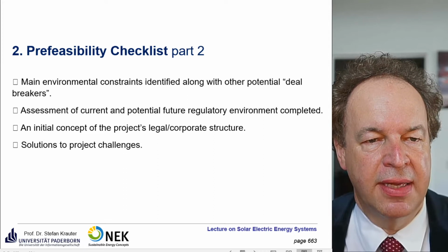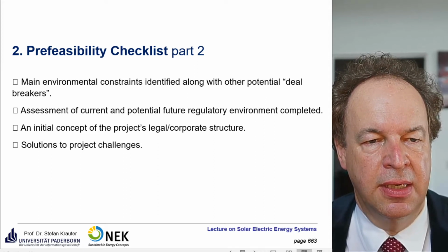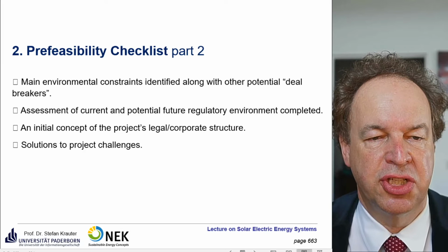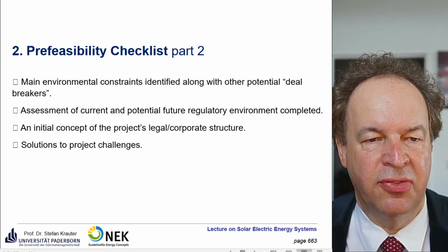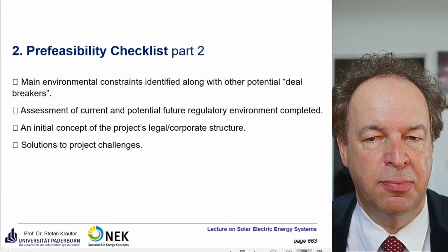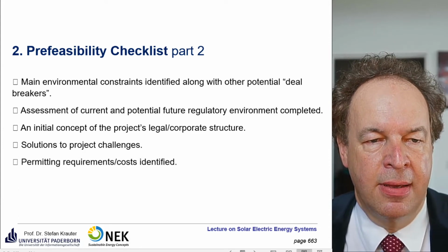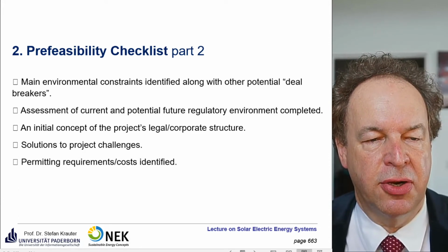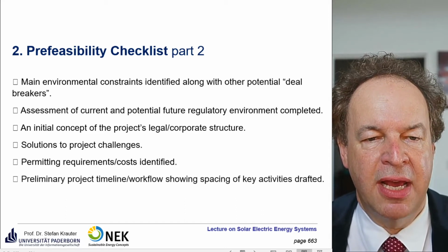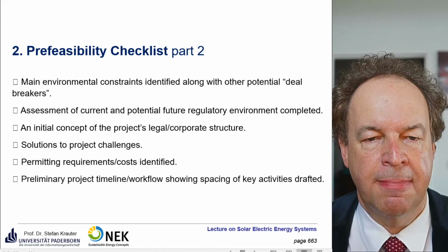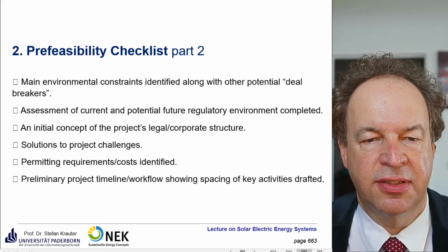And you also have to provide solutions to the project challenges. The bank will interview you and ask you a lot of things: what are the challenges, what are the possible constraints? And then you have to provide the solutions. Permitting requirements and the costs for that. A preliminary project timeline workflow showing the timing of key activities drafted.